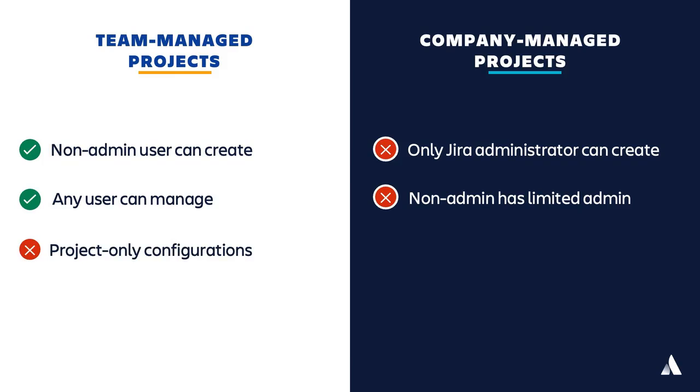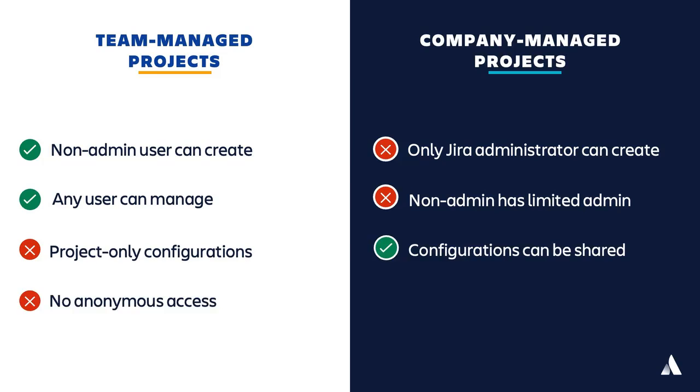Third, the project's permission settings cannot be shared with other projects. However, company-managed projects can share configurations with other projects. And finally, there's no anonymous access to team-managed projects. Whereas anonymous users can potentially access company-managed projects.